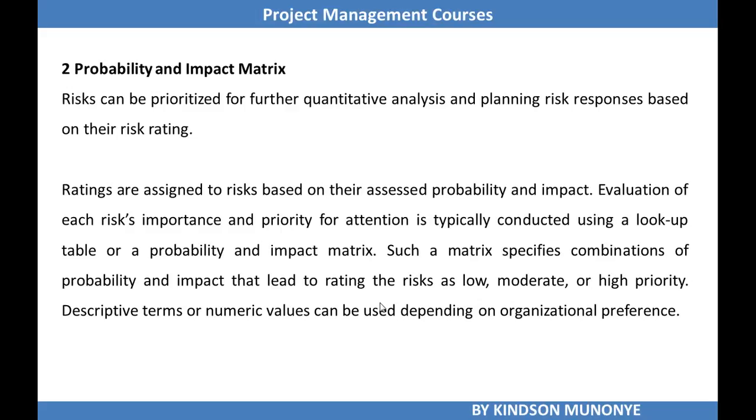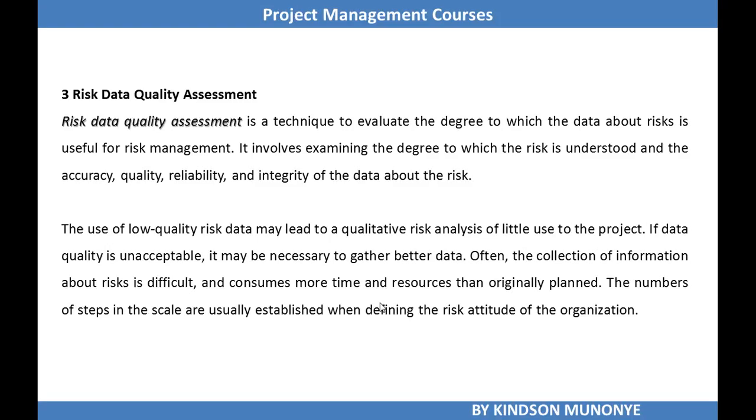Let's move on to the next tool and technique, and that is risk data quality assessment. The risk data quality assessment is a technique to evaluate the degree to which the data about risks is useful for risk management. It involves examining the degree to which the risk is understood and the accuracy, quality, reliability, and integrity of the data about the risk.